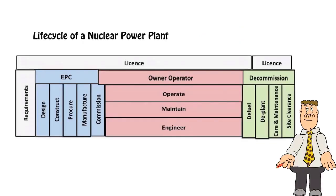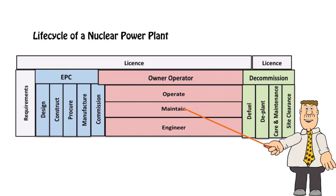I have indicated the problems involved in bringing data from many different sources to enable us to build the digital twin. It is important to get cooperation between suppliers and consumers of data. There should be a supply chain of data written into all contracts and agreements. I could talk for a long time on the issue of data-centric configuration management, and perhaps I will do so in a future video.